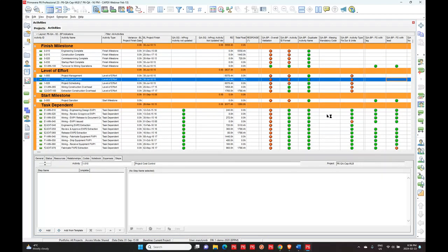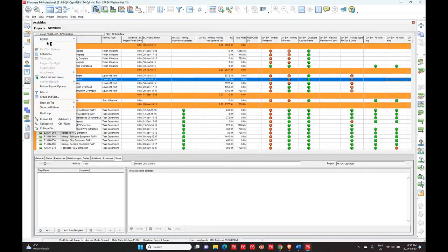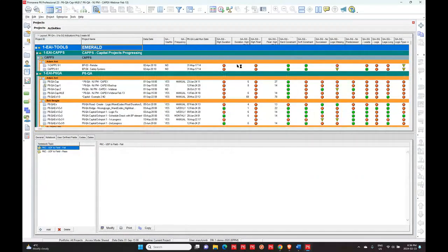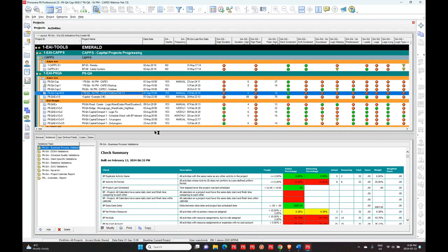You can set up checks in this particular tool so that you can see, do I have a number of activities that have exactly the same activity name? You can't duplicate activity IDs, we all know that, but you can enter supposedly hundreds of activities if that's what actually happened. Hopefully it doesn't happen to you or very often, because that would be very frustrating.